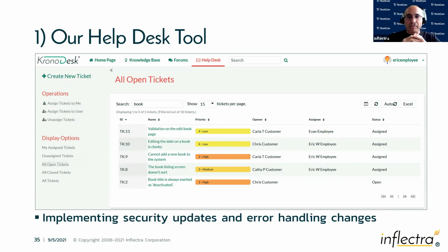And we learned a lot from that about really understanding, don't let a developer go off and just refactor stuff to improve security, even if it's important. Figure out what the security is and what's the least invasive way of making that fix that is secure but doesn't have side effects, and plan it out accordingly. So I think we misestimated what it would take.